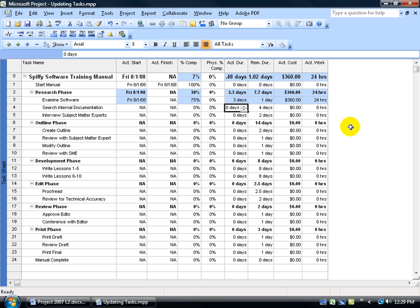And let's take a look at this. When you enter in three days, it says, look, the remaining duration originally was four days, so of the three, you're down to one, which equals four. And you're only 75% complete. We'll hit Undo again.